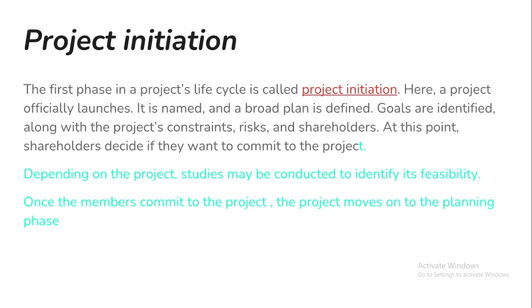And it's at this stage that the stakeholders decide if they really want to commit to the project. So depending on the type of project you have chosen, you have to conduct a feasibility study to identify whether the project you have chosen is really feasible. So let's say it's a warehouse business and that's the project you're setting out to do. You have to do a geographical feasibility, a market feasibility study to see, is this location I've chosen for the project really feasible? Will it work out? Is there a market for this project?